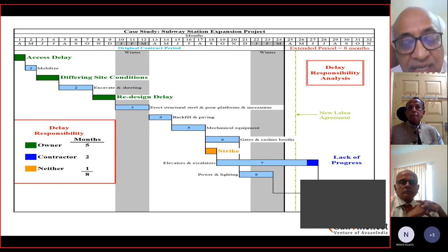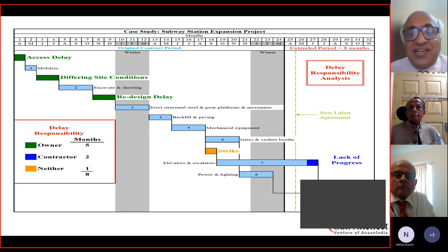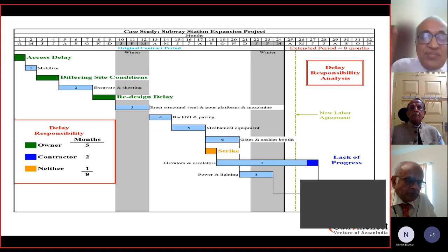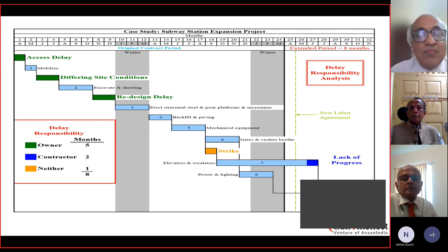So most companies have a limit on these damages, which is linked to the profit of the contractor, because that is really what he can afford. Suppose I'm having a 1 crore contract, but my profitability is 10 lakhs, but the claim is 20 lakhs, then it is obviously not viable. So my deduction will be out of these 10 lakhs. So there will definitely be a discussion. And in many contracts, they do have a limit mentioned for these deductions which can happen to the contractor. Thank you, Ram. Upper limit, yeah.